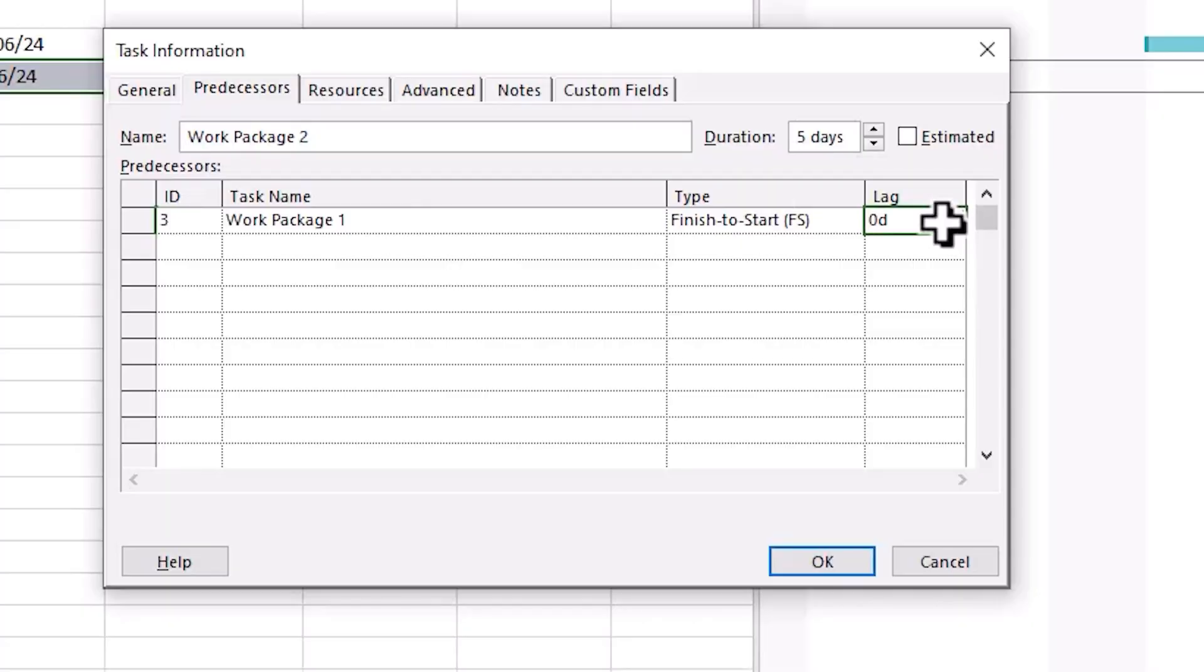That's great, but you may not want the tasks to be immediately triggered in relation to the predecessor. You may want it to start a few days earlier or a few days later. That's where Lag comes in. Located next to the Type column in the Predecessor tab of Task Information, you can add positive or negative values to set the task to start or finish exactly where you want in relation to the predecessor.